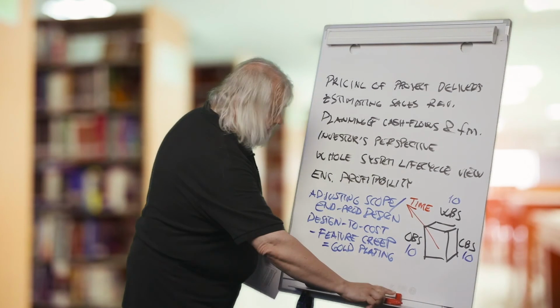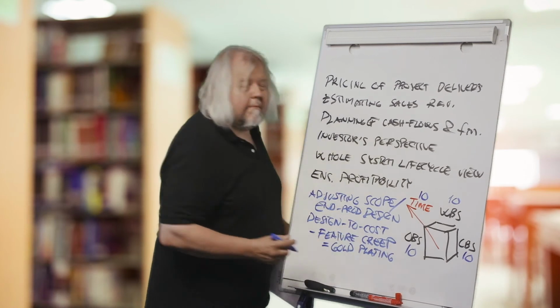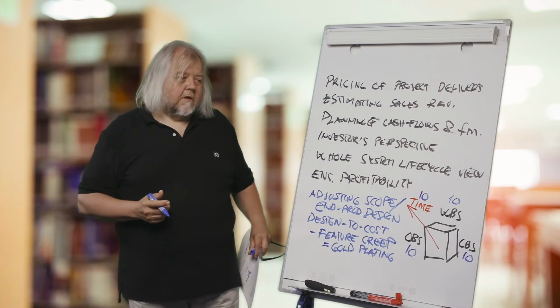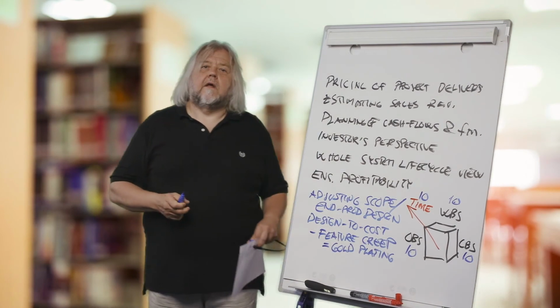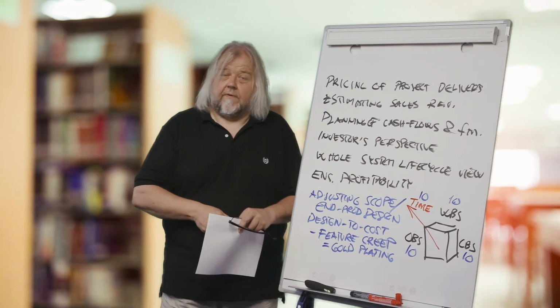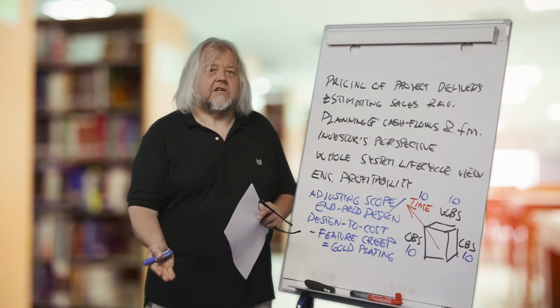And we have in this project a 10 months duration. So we have 10 times 10 times 10 times 10, we have 10,000 positions where we can record costs or even go to budgeting at that level.